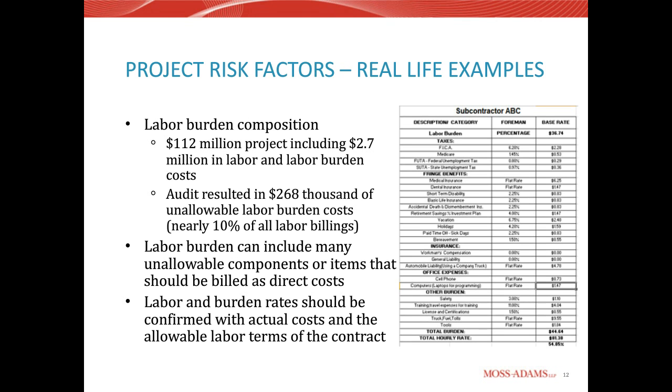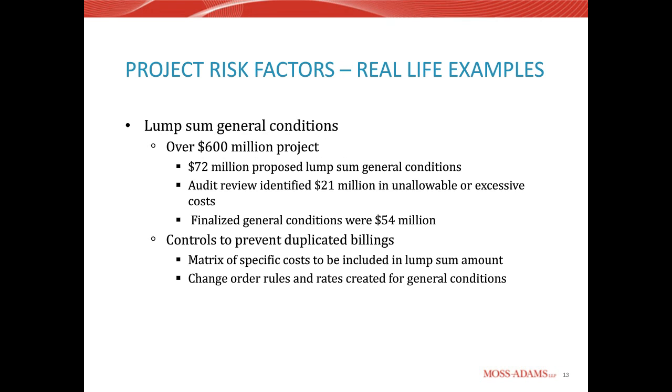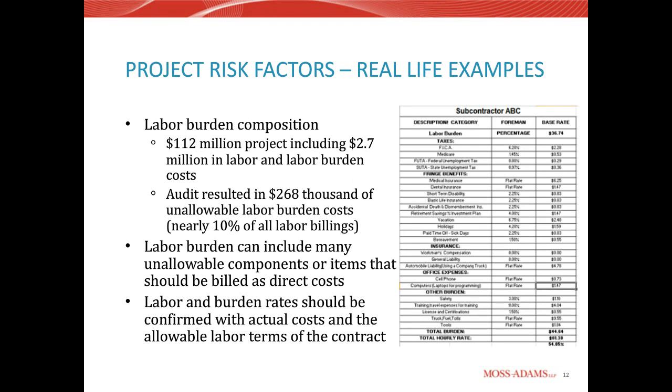And just to follow up on that last slide real quick, the red flag right here that set everything off for us was, if you look at the labor rate, it's $36.74 for this example foreman, and then the burden costs are $44 and some change. Really, burden makes up more than 50% of the total labor cost. That's a red flag for us.